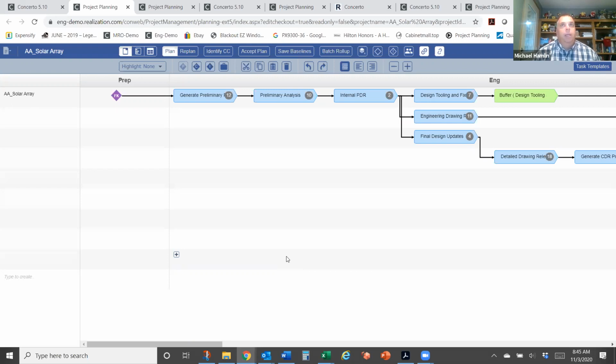This final project plan only has about 18 tier 1 tasks in the roadmap today, right? So we've taken 180 overall activities and we've brought that down to a flow or a roadmap of about 18 steps.